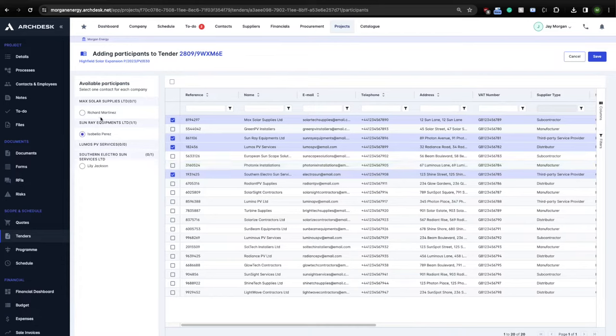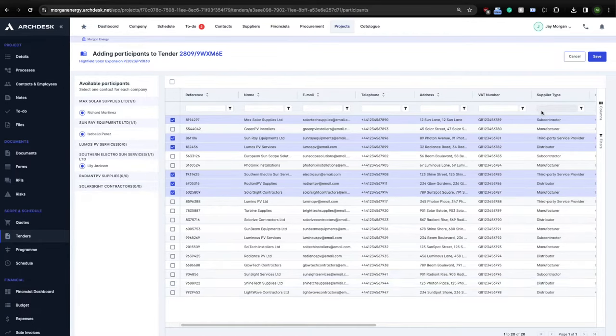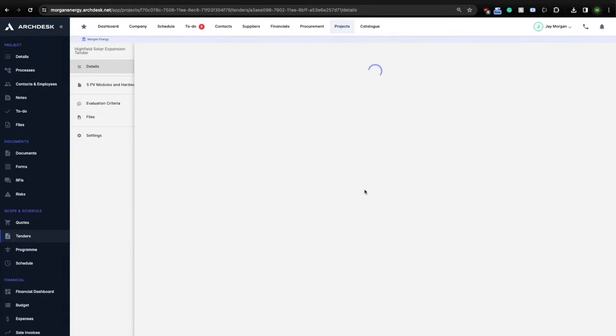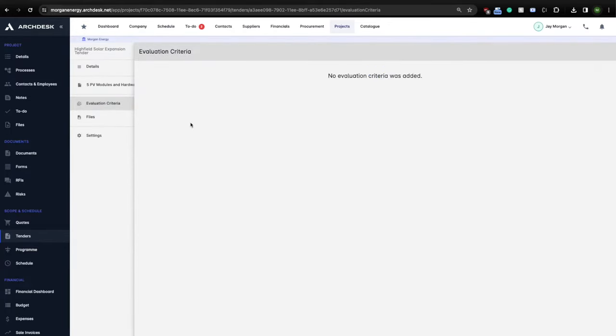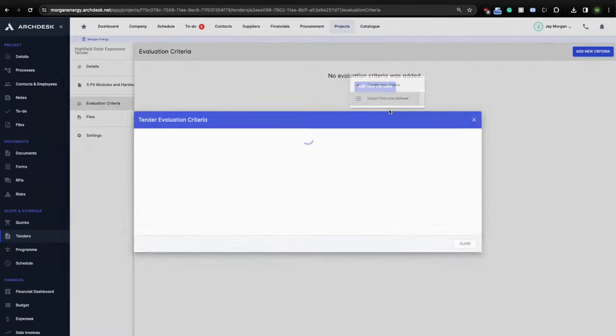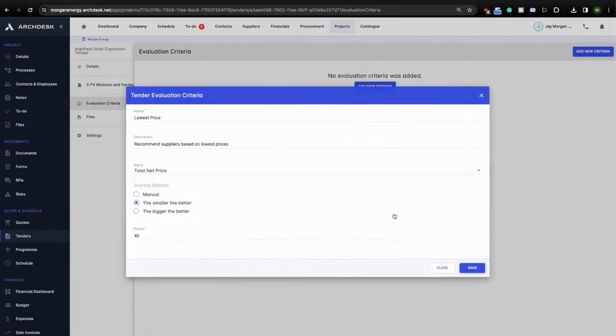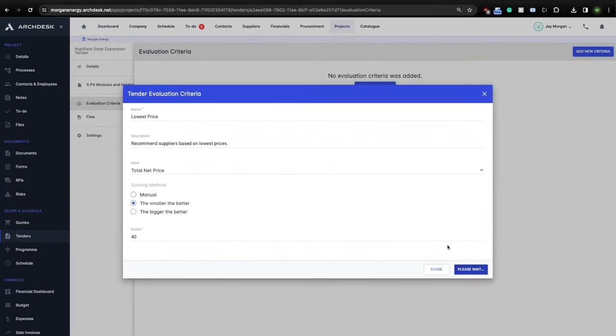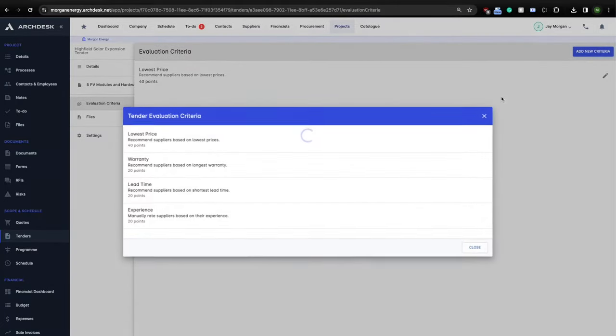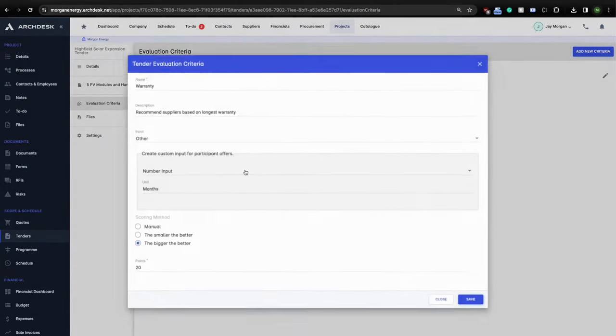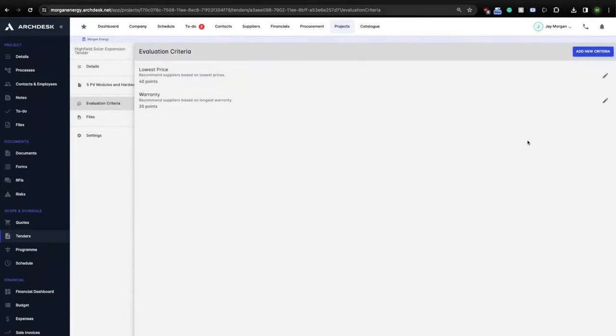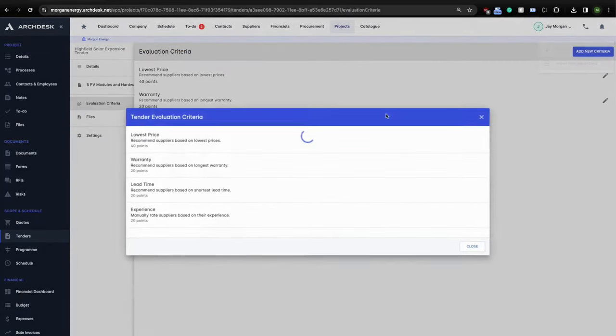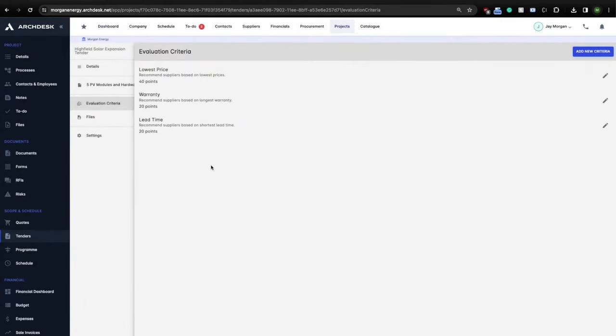Once the participants are saved, you can continue configuring the tender. You can optionally configure what we call evaluation criteria. With the evaluation criteria, ArcDesk will automatically recommend the best suppliers on the basis of criteria you specify. For example, lowest price, warranty length, lead time, or any other attribute you need ArcDesk to ask your participating suppliers.